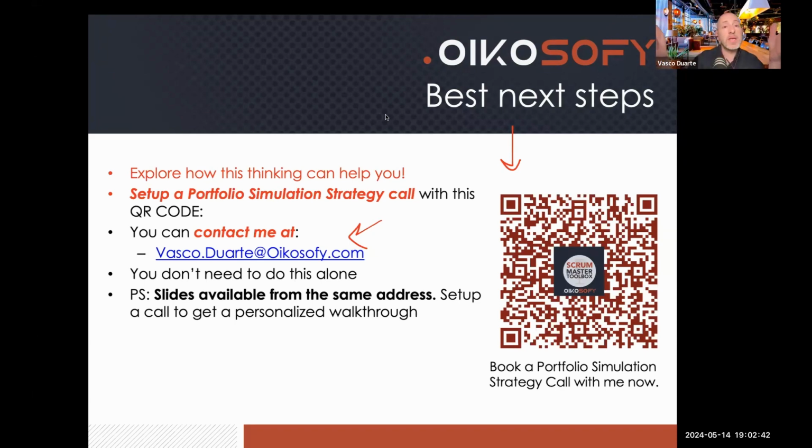So what we do is we bring that conversation up one layer to the portfolio level, and we say, okay, so instead of saying these are the projects I want to do next year, let's say, what do we expect these projects to prove within the next month? And then next month we review, are they likely to deliver that which we expected last month? And we update the beliefs.